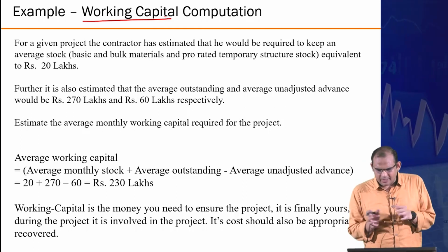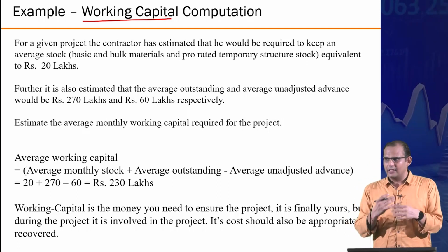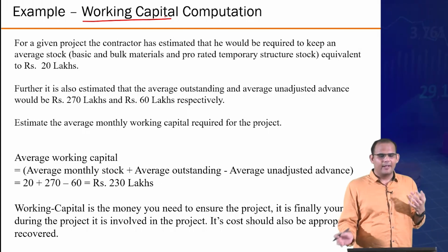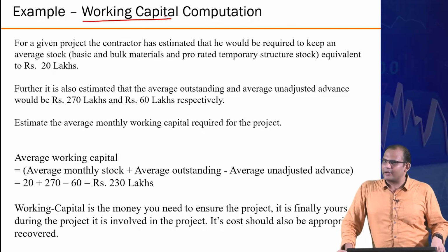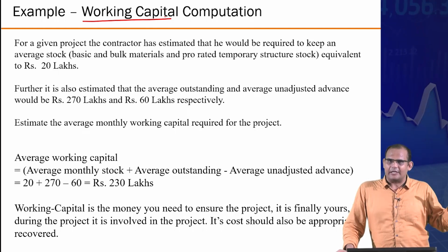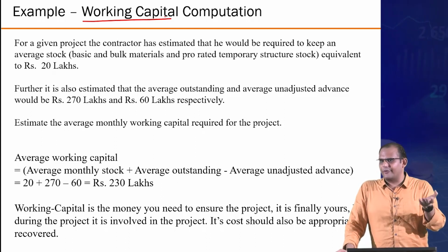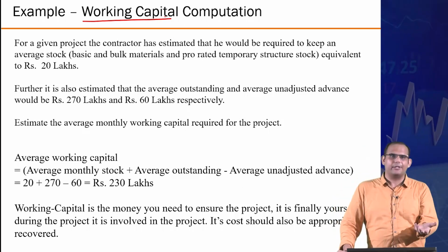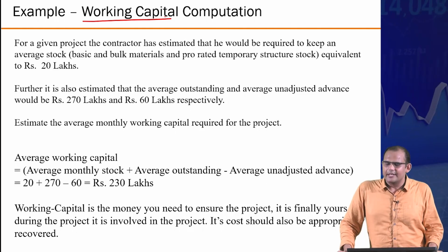So, yes, certain factors can reduce your requirement of working capital. Certain factors will go against you in terms of working capital. For example, if the client is not paying you as frequently, then it's a huge requirement. Also, the type of contract. For example, the contract is that you get paid only after completion of the whole project. So if your project is of 450 crores of cost, then that is your working capital requirement. Right now, you need to pay those people to get the work done. Otherwise, the work will not be done, right? So this is the main idea.